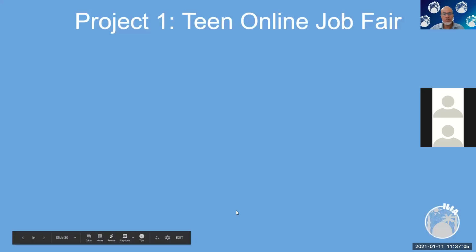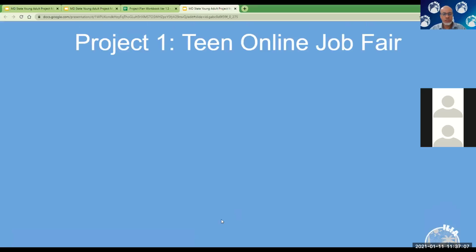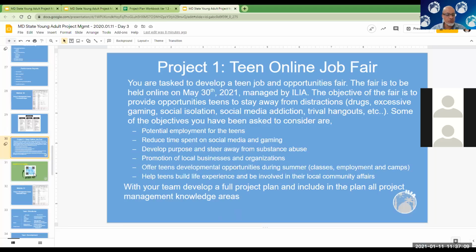All right. So let's go back to our project. What you guys want to do here is spend some time defining how you're going to communicate with your team, identifying things that you might need to purchase for procurement, and what these things are. You want to include that in your WBS. So if you have any steps related to purchasing supplies or material or hiring people, because we talked about resources as well, and communications, you want to include that in your WBS.